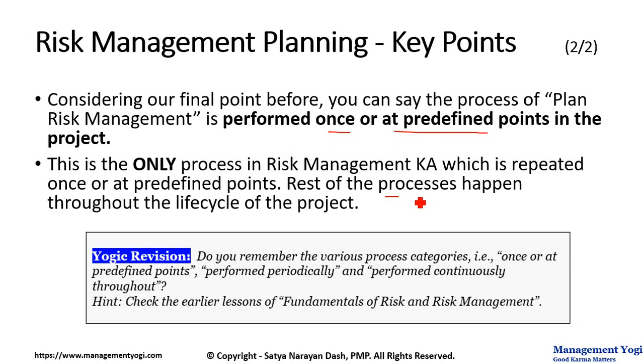Rest of the processes, that is from identify risks to monitor risks: identify risks, perform qualitative risk analysis, perform quantitative risk analysis, plan risk responses, implement risk responses, and monitor risks, will happen throughout the life cycle of the project. Those won't be happening at once or at predefined points.